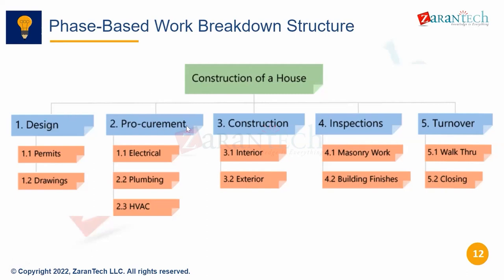So these are level two WBS elements, then these are level three WBS elements for our understanding in SAP PS. The level one WBS element is usually called the root WBS element, R-O-O-T. In most cases there is only one level one WBS element, but there can be instances where there are multiple level one WBS elements also. That is also possible.